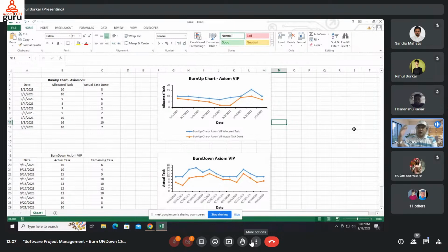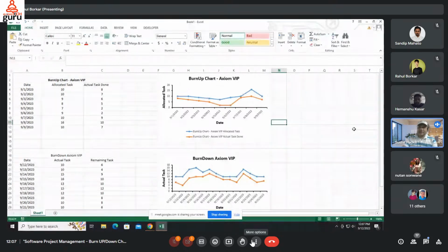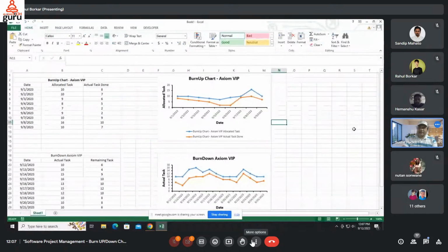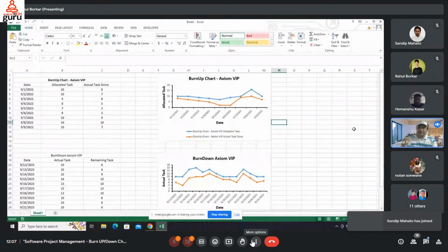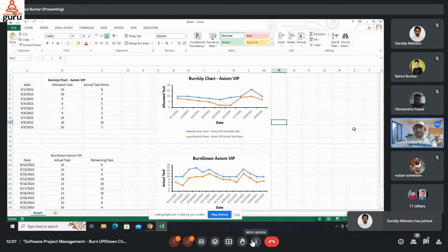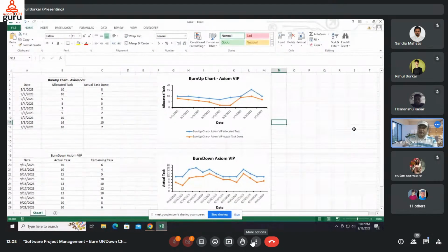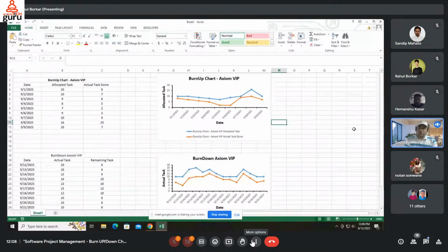In this manner, all the backlog items will be assigned to various development team members, who perform the various roles in a team. The user story is accessible to them. They need to understand what the objective is, what the description is, and the supportive attached files, right? And the story points indicate the number of hours allocated to them. They can comment on that particular user story, and they can submit their work over there.